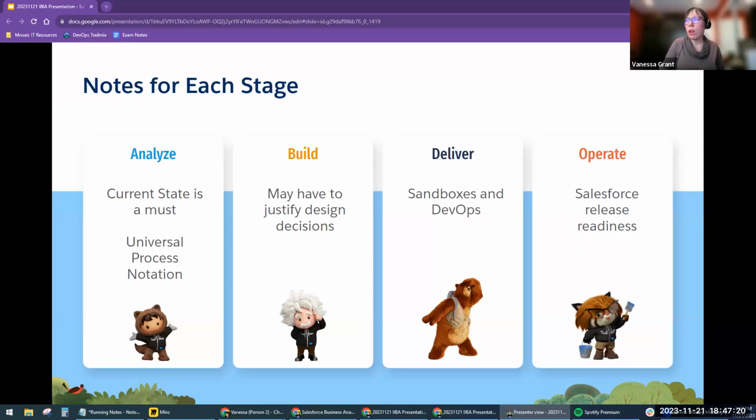Oh God, I was on this project. It was like a $20 million Salesforce project. It was gigantic. There were like 100 consultants on it, and I think we had 1,000 user stories, and then we ended up with over 1,000 bugs and changes, and that was just a lack of business analysis. It was such a high profile project, and folks just wanted to charge in, and there's only so much you can do, and only so much you can manage up.